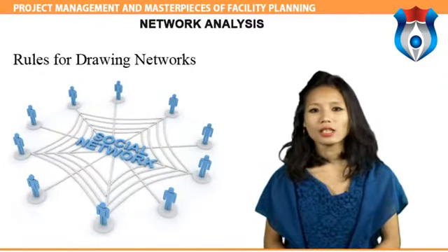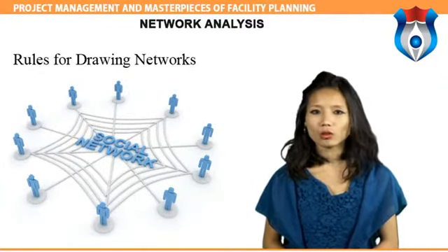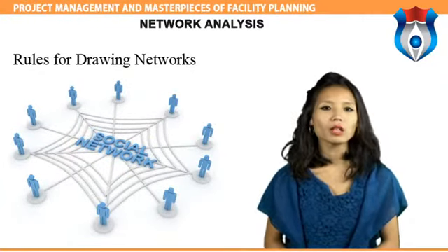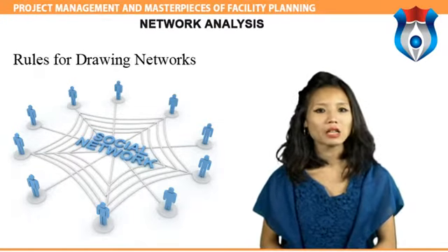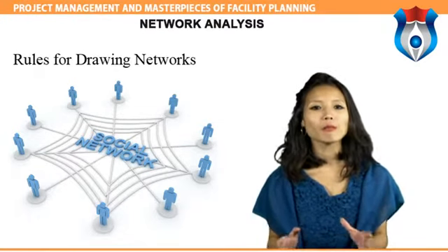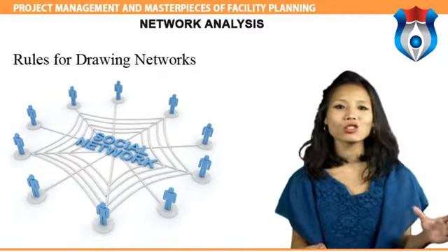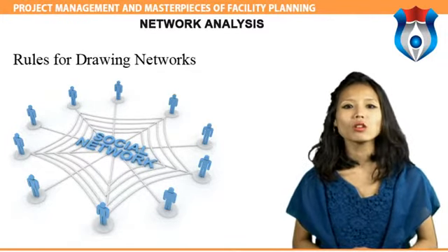However, an activity must not share the same tail event and the same head event with any other activities. No activity can start until its tail event is reached. An event is not complete until all activities leading in it are complete. This is an important rule and invariably has to be applied in examination question.